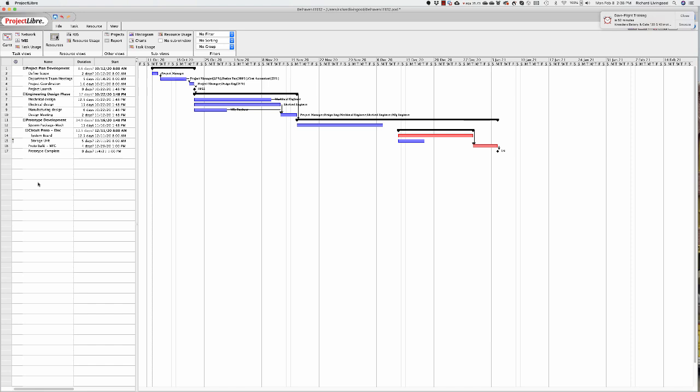Well, what if on a couple of days you actually had to get a second camera because you had 2 different shootings going at the same time, two different locations where they were doing filming? Well, it would be easier to do it in the project management tool than it would be to add it in. You have to go back out, add it in a spreadsheet someplace, then take that value and add it in someplace else, and then the next thing you know, you finally have your cost. If you put everything in here, guess what? It's all there, and it's all accounted for. Not only is it accounted for time-wise, but it's accounted for cost-wise.